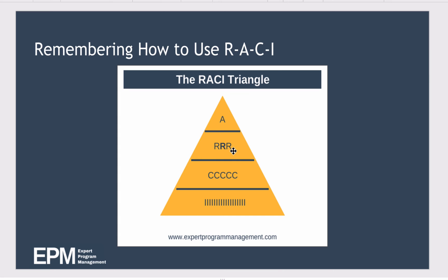Looking at the triangle: at the top you have just one accountable person, there can be multiple people responsible for doing the work, there can be lots of people you consult with, and lots of people may need to be informed.